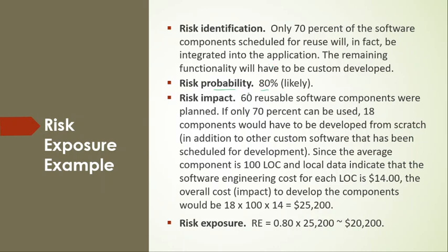And now the risk impact: 60 reusable software components were planned, from previous components that we are going to reuse. If only 70% can be used, then 18 components would have to be developed from the very scratch.